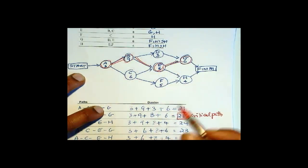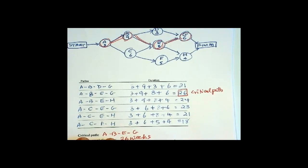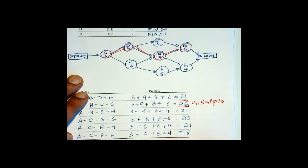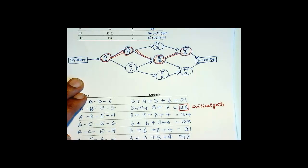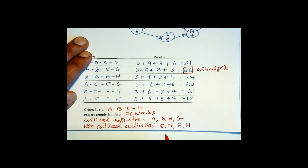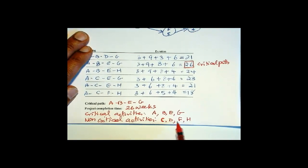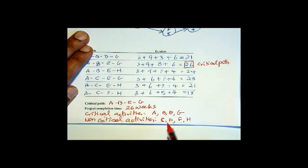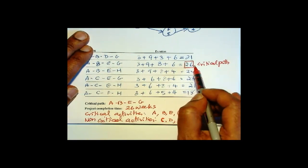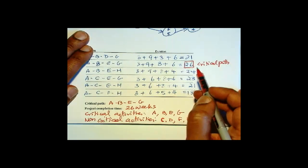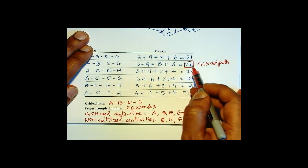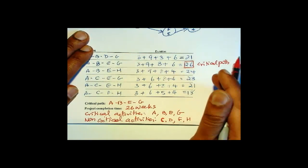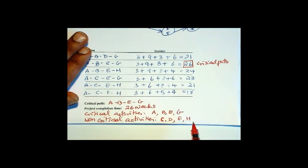So the non-critical activities are C, D, F, and H. Any delay in these activities, as long as the paths do not extend beyond 26, the project completion time will remain at 26 — it will not change. That's the reason why these are non-critical activities: C, D, F, and H.